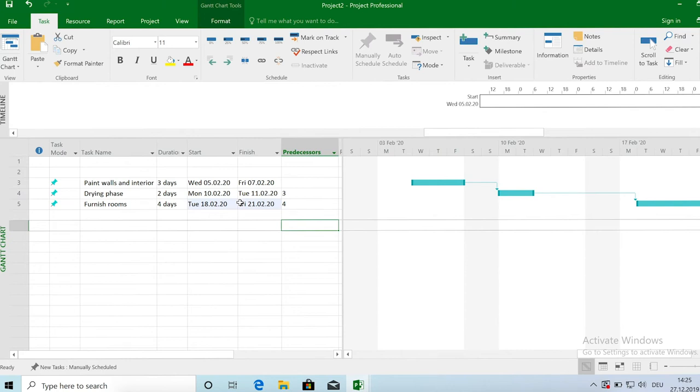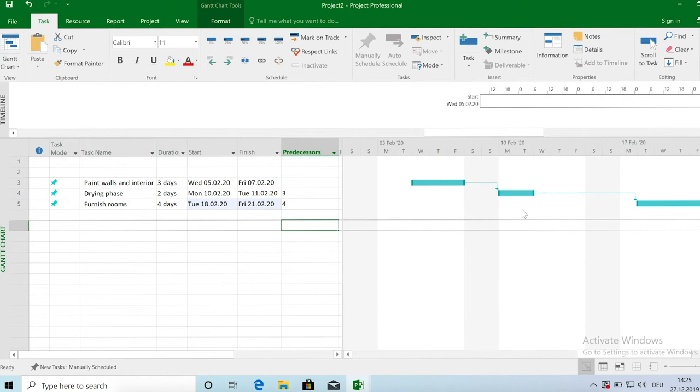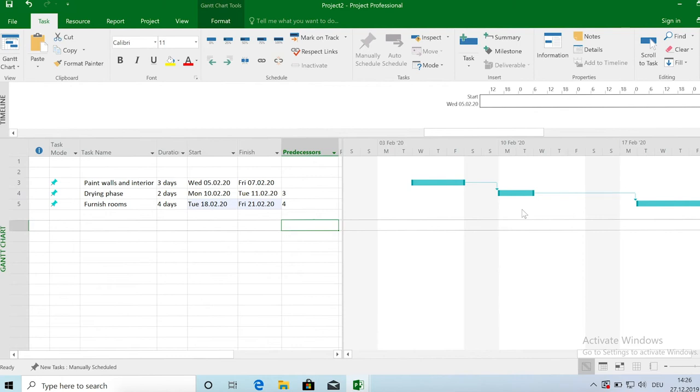Now the problem is we are in this case not optimizing our schedule for the minimum project duration. So we are wasting a lot of time here because we are just defining when each task should start. But normally in projects especially at the start you want to have a clear overview, a clear idea of how to optimally arrange each task and to schedule each task so the overall project duration is minimized. So we can complete the project as quickly as possible. Of course it can change later when you have people falling sick or tasks be moved so there will be delays that's common but at least for the start you want to optimize the project plan to have minimum duration. And this is not done when you are working in the manual mode.